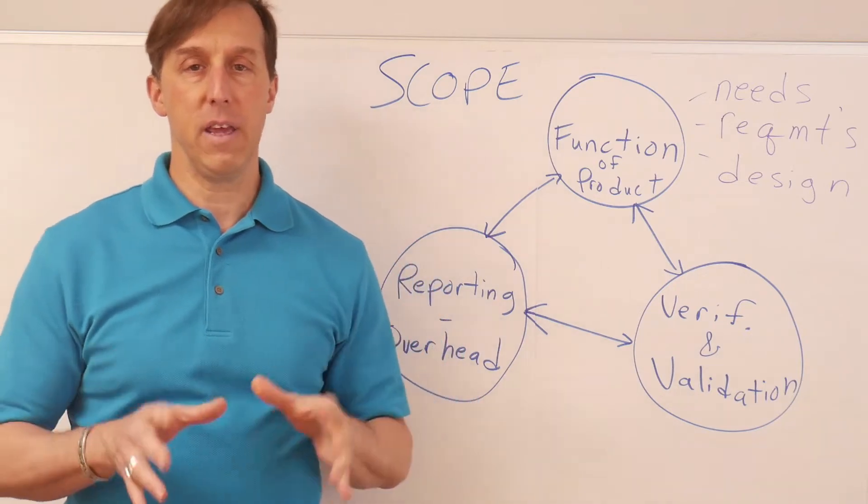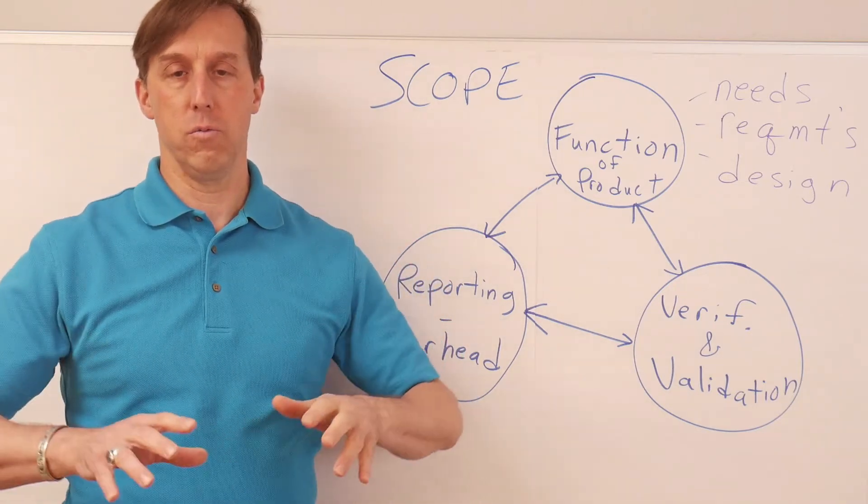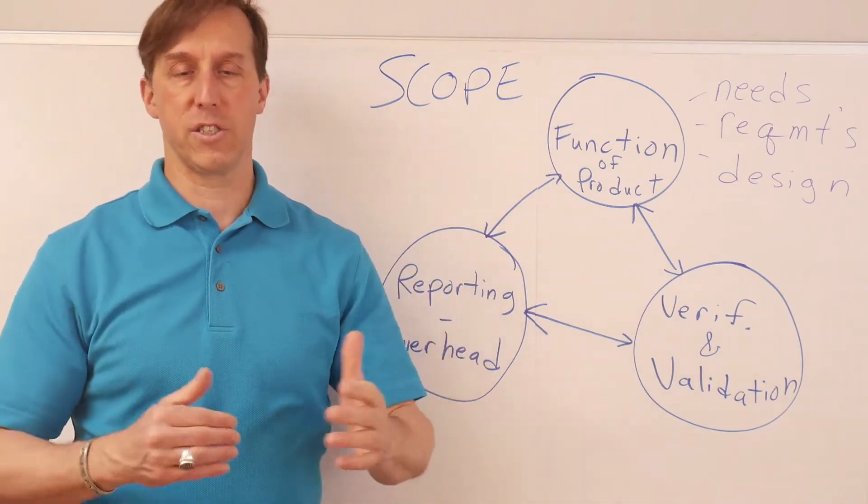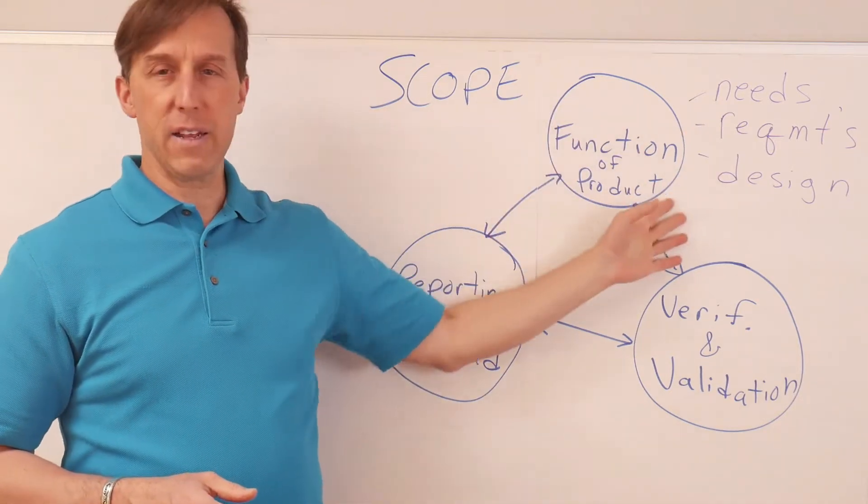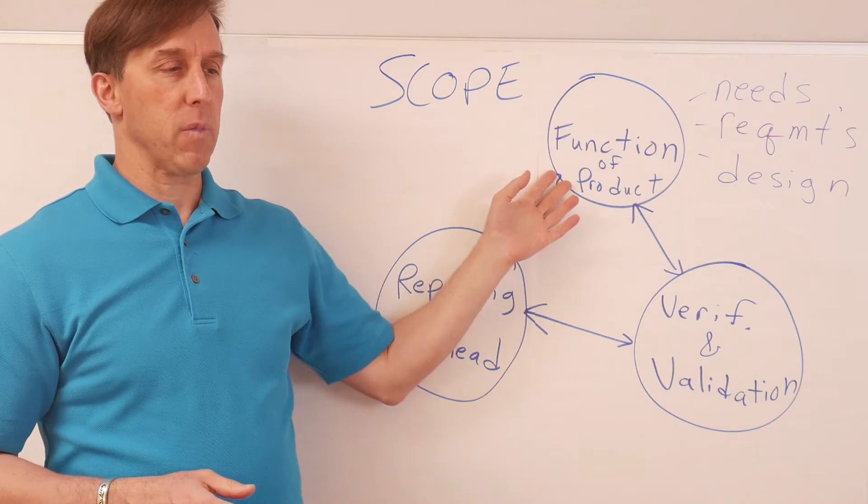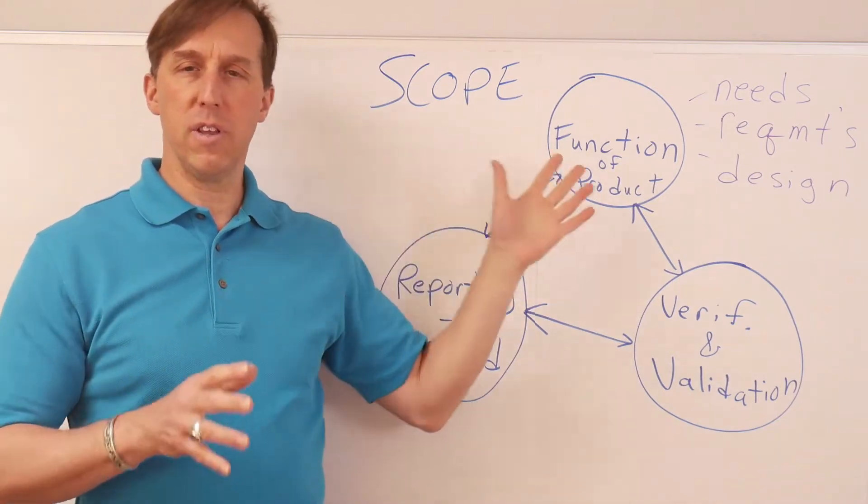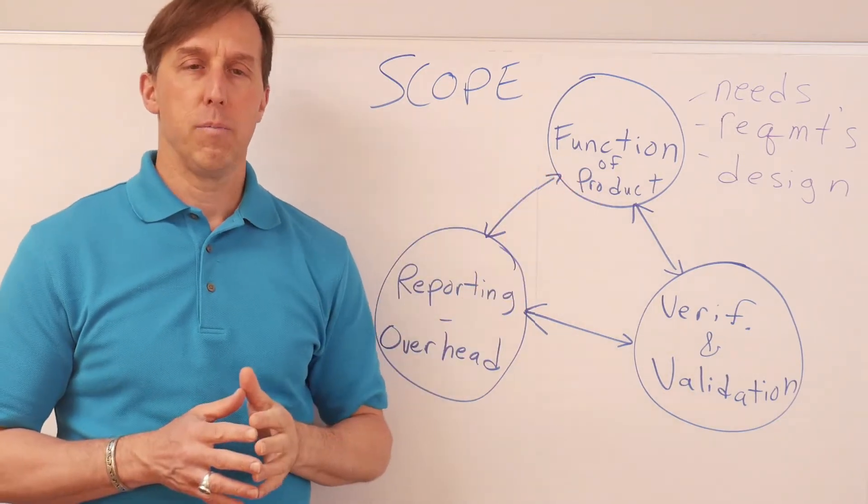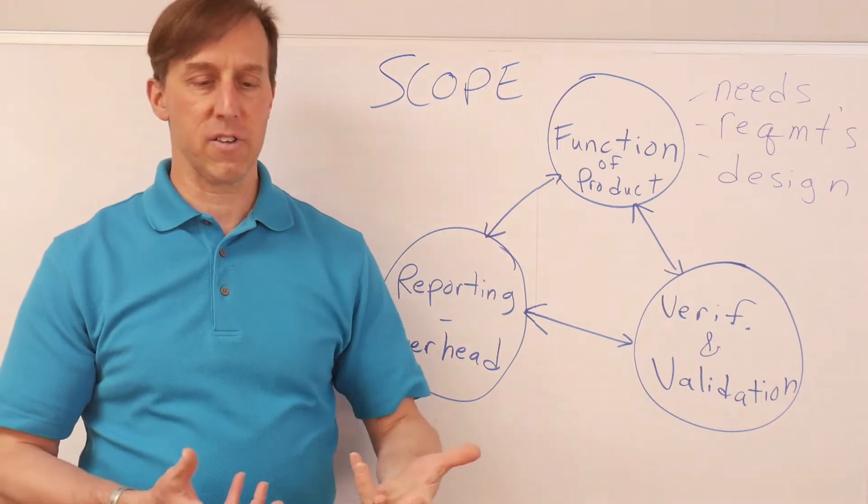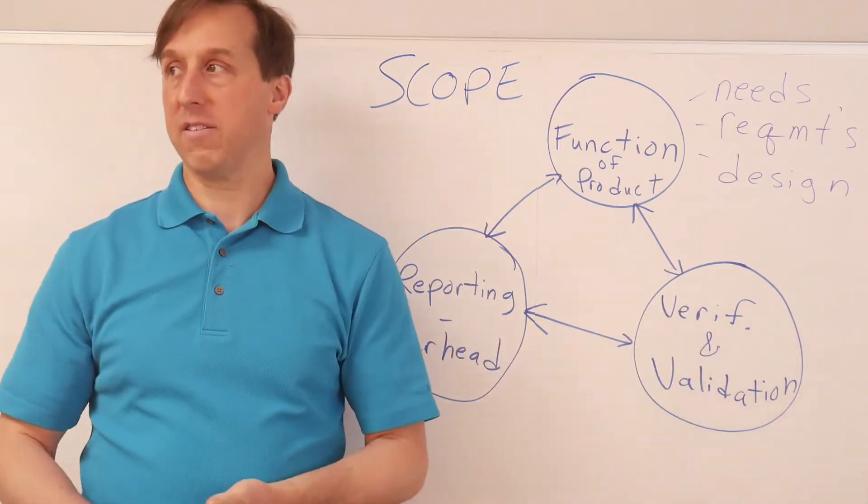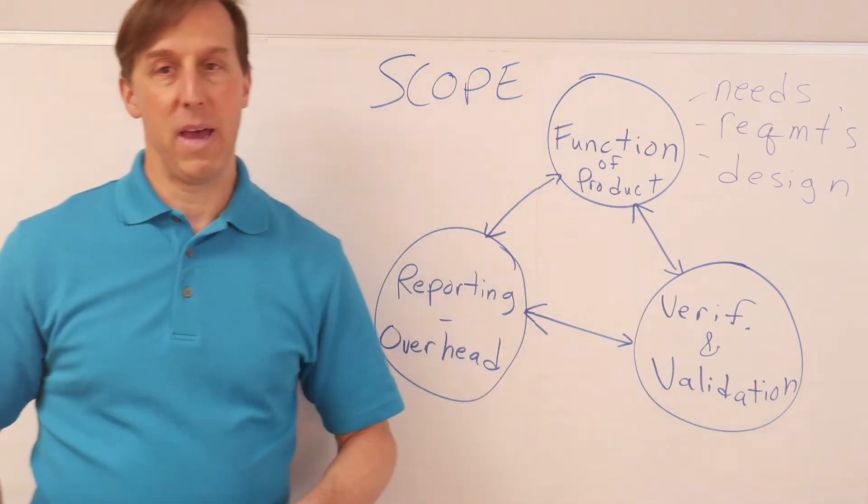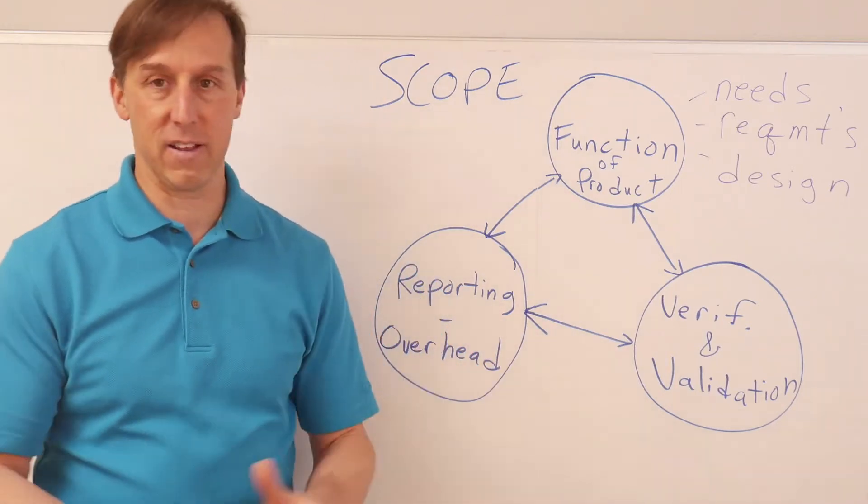Tests can often be the most expensive item to try and budget and schedule around for your technical program. Certainly getting the scope is complex. Sometimes it needs a fair amount of work, but to actually design something doesn't take, in my experience, as long as setting up the test, designing the test, running the test, paying the technicians to operate the test, and then collecting the data.